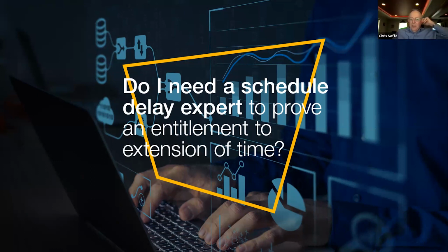Thank you, Hossam. So the experts agree there that really this is a matter of complexity. Thinking of simple suspension of work claims or delayed start, or perhaps just a number of weather days, are both usually very simple to assess. So you wouldn't necessarily need an expert planner or delay analyst for that. The more complex the issues, or a single issue, the more reason to engage, I think, a schedule expert. And of course, always the parties can agree on a number of days, and they can agree on quantum, even if they're in different fields, in order to move a dispute forward to a settlement mode. So there are always options.